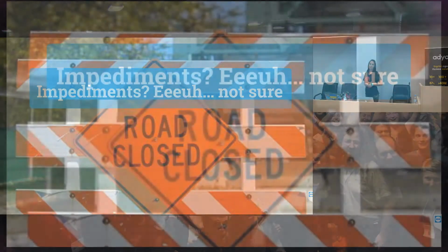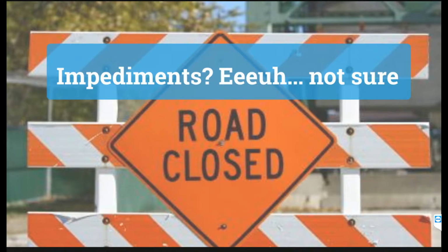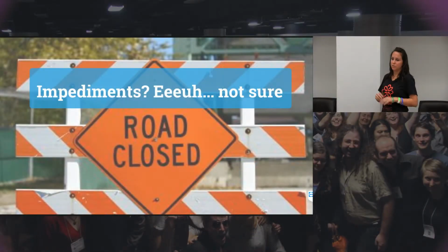Every day we started with a daily stand-up, and the last question of the daily stand-up is, okay, guys, are there any impediments? Do we need to take something out? Is there anything not going that well? And actually, as a Scrum Master, I couldn't even have an overview myself, and the guys were like, I don't really know, maybe not, maybe we can finish it, I don't really have an overview. So it was always like, okay, let's wait a few more days and see if anything bad happens, and then make statistics of the sprint: how many stories are still open, what are the estimations. We had to do almost calculations on a sprint to see if it was feasible.